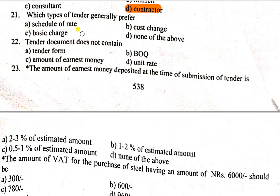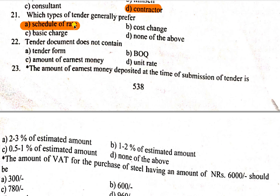Question number 20/21: Which type of tender is generally preferred? In Nepal, what type of tender is generally preferred? The options are: Schedule of Rate, Cost Change, Basic Change, and None of the Above. The Schedule of Rate type of tender is preferred. The tender document does not contain what we have to publish — it contains a tender form.